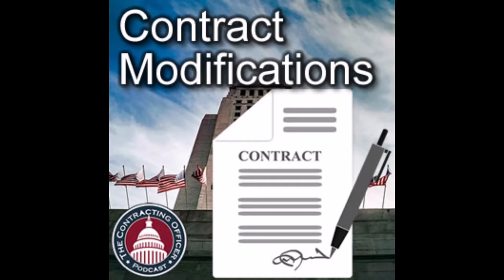Close scene. So this is huge. This is right out of the FAR. And what it basically says is, yes, you have to have all the documentation. Everything has to be perfect. And yes, you have to negotiate every little nuance of the contract before anything happens, unless it could adversely impact the interest of the government. In other words, unless you really need to get it done.